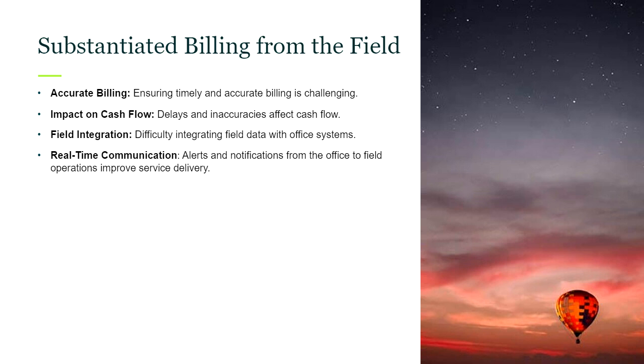Maybe we're emailing documentation from somebody out in the field, and then somebody, like a project coordinator or a project biller, has to gather all this information and put it together in order to substantiate the bill before it goes out to our customer. It sometimes takes too long to get that invoice out, and therefore delays in payment and delays in cash flow really affect the overall business.